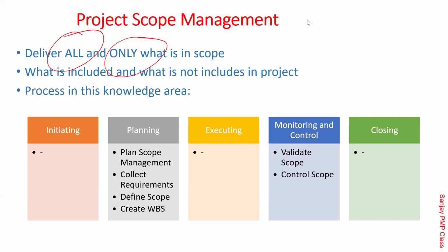Now what happens, there are challenges, Pawan. One of the problems is that the cost and time might increase. The second problem is that some effort is required for that. The third problem is that there are cascading things. Documentation will be required for it. Post go-live, some additional bugs come.